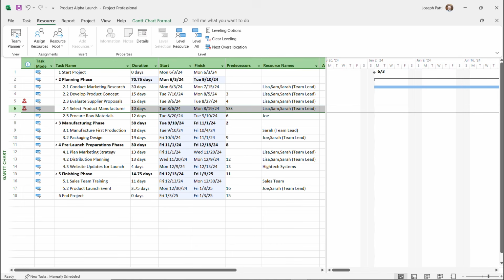It actually saves us a ton of time. It now says that we'll finish this by the 3rd. And you can do that with a lot of them. You can go through and try to figure out what's going to make sense. You will notice, though, since we are starting these at the same time, that now we are a little over allocated. So we want to be sure that Sarah and their team is not going to be overwhelmed.